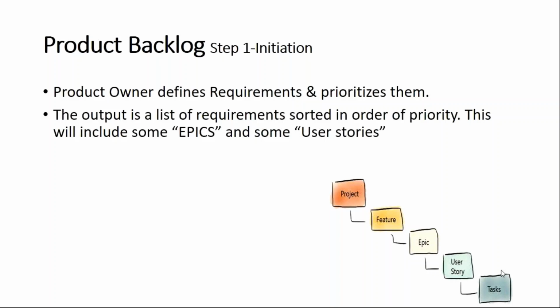Since you mentioned that you want that workflow, I'm also working on a similar thing. The dashboard is not reflecting the right data because one user story is related to multiple epics, which is wrong. So I'm doing data cleanup so that the CFO-level people can understand the progress of the project: how much is still in development, how much is still in backlog, and how much has been achieved.